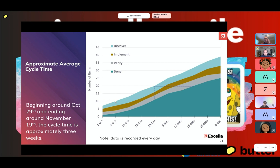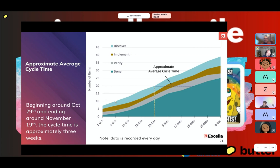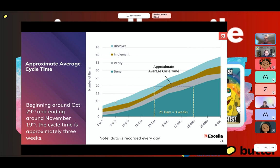The average cycle time — as I've defined it — is from the moment something enters your system all the way to when it's done. On the CFD, that's the horizontal distance shown by the dotted black line: when we brought it into the system to when it gets done. Drawing vertical lines, we can see we brought it in on October 29th and it looks like it finishes near November 19th — that's about 21 days, or approximately three weeks.